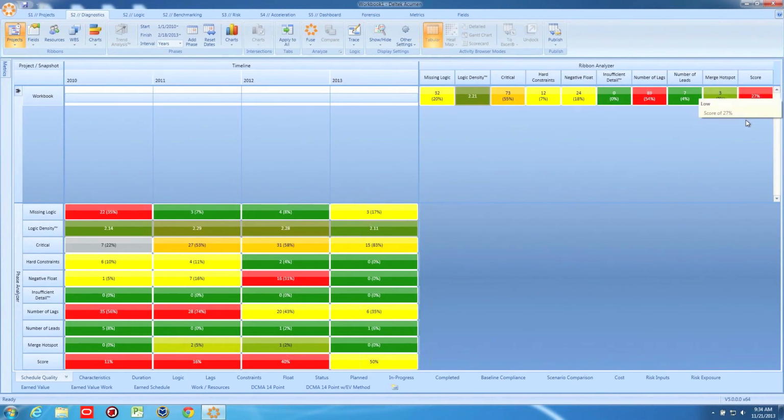So as I work with this and as we drill down and roll up, we want to make sure that we're seeing improvement here. If we're not, it means we're making quality improvements that are actually at the expense of other areas in the schedule. If we're removing certain types of logic and replacing it with other areas, well, what happens to the tasks that we've removed the logic from? They potentially run the risk of having increased missing logic. So I can't rob Peter to pay Paul.